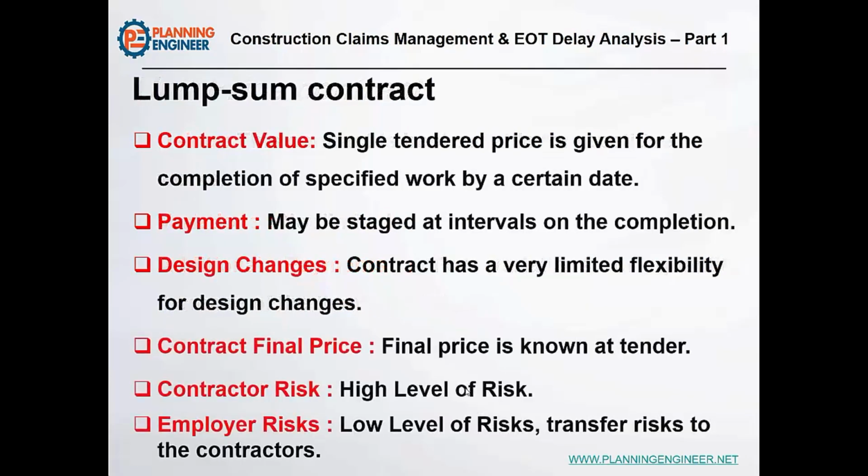The opposite here is the lump sum contract. Lump sum contracts mean that both client and contractor agreed to execute this work with this amount. However, if the executed quantity exceeded the BOQ quantity or was less than the bill of quantities, the contractor will be paid only the amount in the bill of quantity.